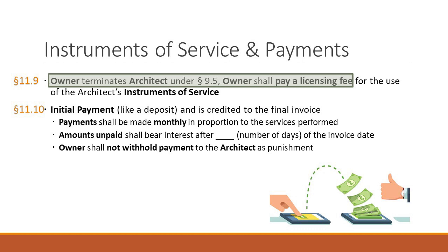The owner says, yeah, you were supposed to finish this project by August 1st, and now you're going to be delayed, so I'm going to charge liquidated damages against you, and there's going to be a fight over whether the owner's entitled to its damages. You say you're owed $500,000 for the additional work, I'm saying you're going to owe me $1 million for liquidated damages. So that's a discussion that's ongoing between the contractor and the owner. At the end of the day, though, the architect or the owner may have to pay some money, and it may be due to the fault of the architect's design.